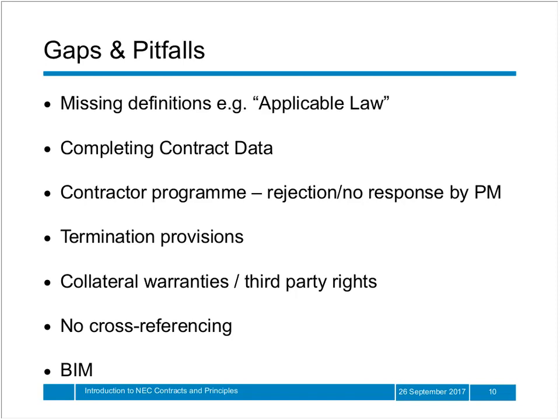The termination provisions also need to be carefully considered and amended where necessary. The arrangement and presentation of the termination provisions in the NEC contract is helpful, with a defined list of termination reasons, which are then presented by way of a procedure and amount due for each termination reason, depending on whether it's the employer or the contractor terminating. Although there are 21 reasons for termination in the standard form, the reasons are actually fewer in scope than most practitioners would be used to or would expect in a contract.